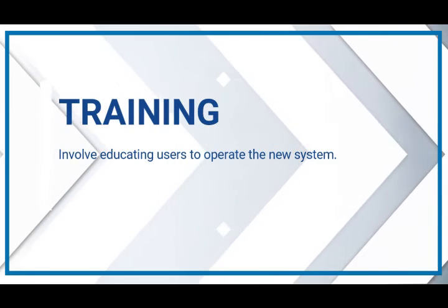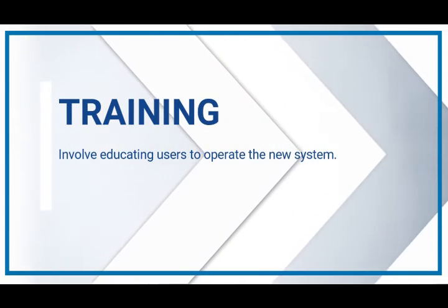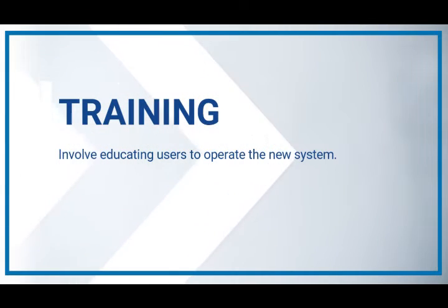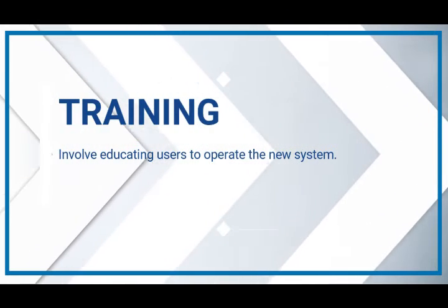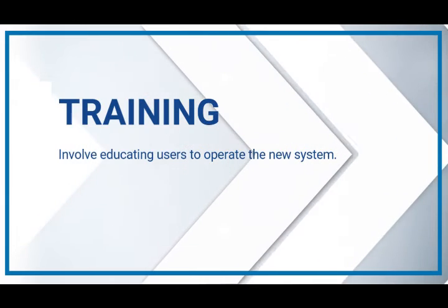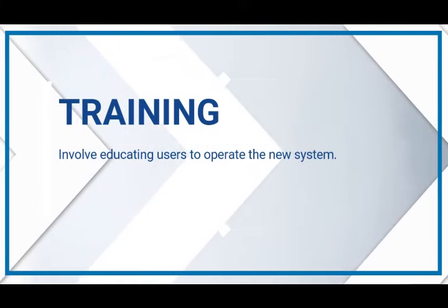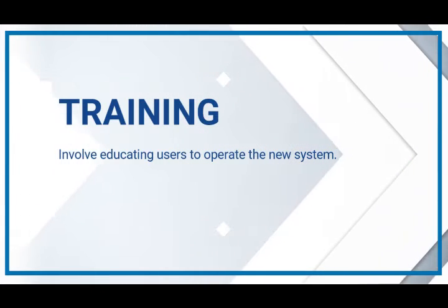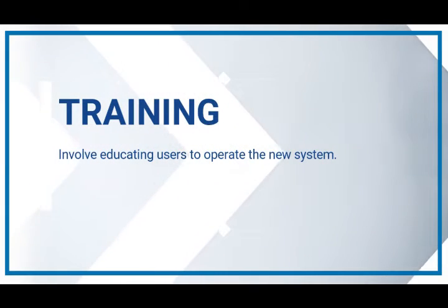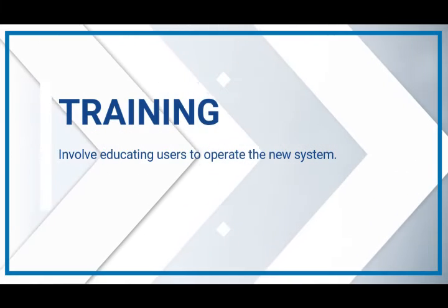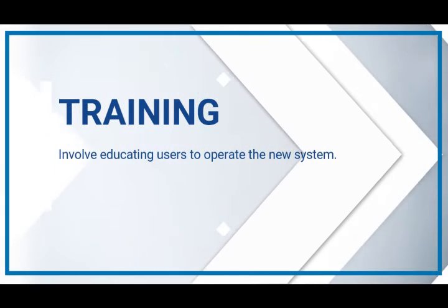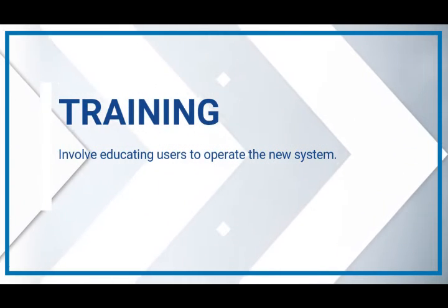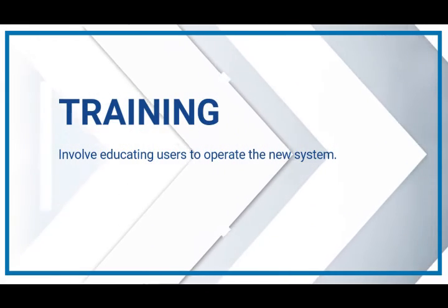The cost of an in-house training program includes instruction time, classroom facilities, and lost productivity. This cost is often the first one cut to meet budgets, and such an action can be fatal to systems development. Example: Hirsch's ERP implementation disaster was blamed in part on the drastic reduction in employee training before going live. So, accountants and auditors should be aware of the danger of cutting this important part of systems development.